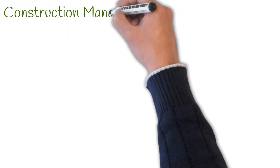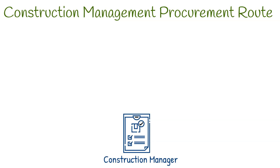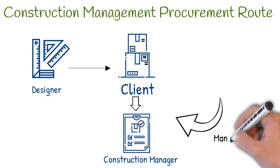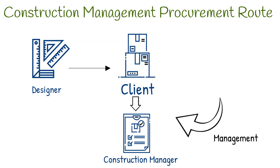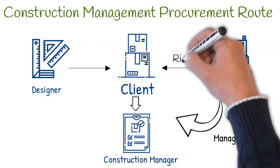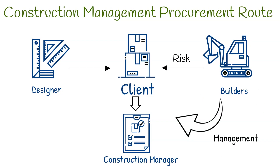And lastly, we have construction management. This is a slight variation to management contracting. Under this route, a construction manager is employed to manage the construction works. Unlike management contracting, the construction manager is a member of the client's team, who will advise on the construction as well as manage it. The contractors are directly employed by the client, meaning the construction manager holds no risk for the works above his reasonable skill and care. The construction manager is paid a fee for their services.